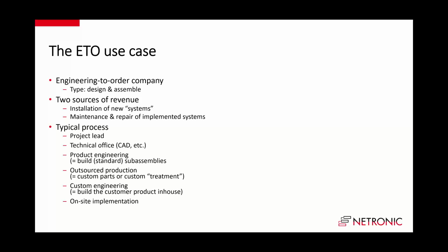Parallel to this, there will be also some components or some parts that we need, or sometimes there are some processes that need to be done to help the product engineering teams that we outsource. So in the metal industry, where you build some metal cabinets for customers, sometimes they need to get galvanized, and the galvanizing line is quite an expensive thing, and it is often not affordable for those engineering-to-order customers that I have in mind. So whenever they have galvanizing work to do, they send the material to their subcontractor and receive it back after a certain point of time.